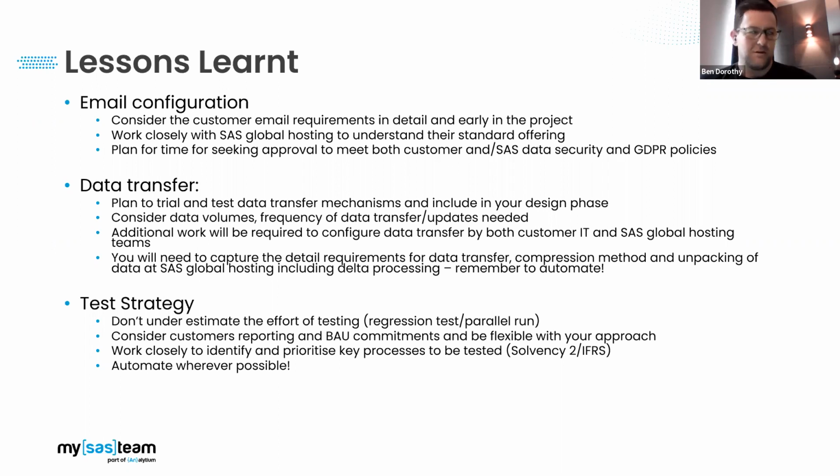We found in the recent project that we had to trial and test many different methods before we found an optimum solution that worked with the method of data transfer we had, and our limitations around bandwidth at the time. And the final point on this would be to remember to automate as much as possible. As Pavel described, we automated the transfer and updating of the deltas as much as we could. I think it was pretty much hands off, apart from pressing the go button.